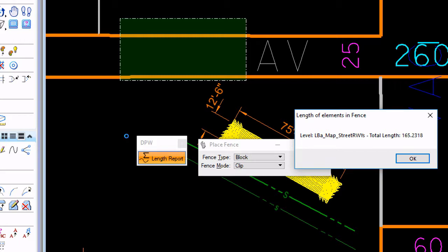This was because TNL have their striping plans, and they wanted to calculate some cost estimates for striping for each sheet. They could just go to their design model, put a fence in, and calculate all the striping for each part of the project. Does this work only in design view or sheet view too? Sheet view too. But I'm not sure if it's going to measure in inches or feet, so I haven't tried it yet. The units are whatever is active. Right now we're in survey feet. So if you do it in sheet, you scale it. I haven't tried it. It's a good experiment to see what it does.